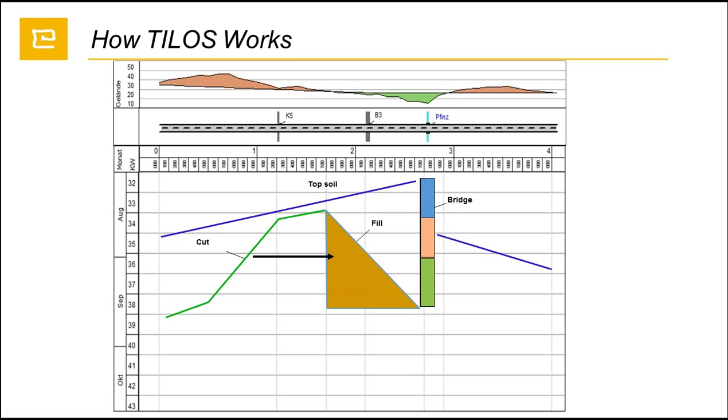Besides the structural and straight-line activities, let's say linear activities, we are also able to show the activities which are quantity-based. As you can see, the cutting line has two breaks here. Why two breaks? Because if we look at the top, we can see that the amount which is supposed to be cut between 1,700 and 1,200 is less than the amount which is supposed to be cut between 600 and 1,200.